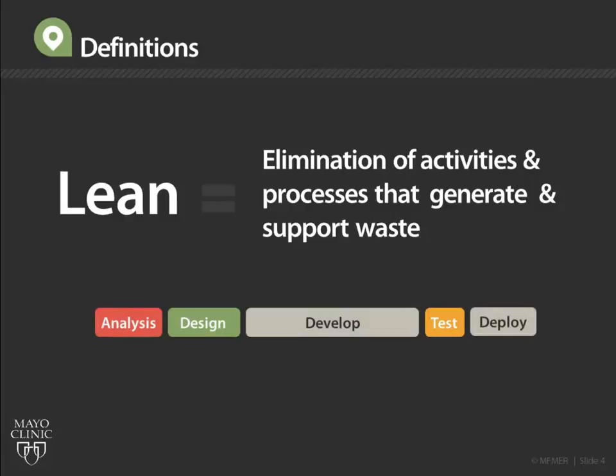So here we have a typical workflow for a technology product, maybe a new web application. You'll see there are 5 phases, and each phase is completed once before the next phase is started. This is called a waterfall workflow. Typically, a project's budget is distributed like this. The analysis phase gets a chunk of money, design gets a smaller chunk, development gets a whole wad of cash because it's seen as the most important, and developers' time costs a lot.